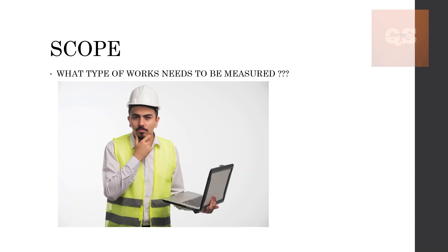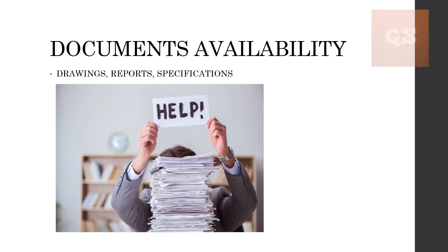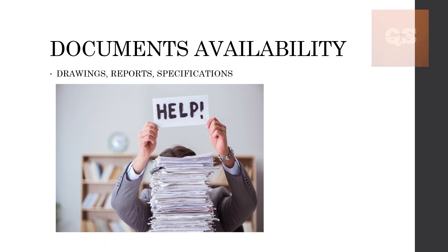Next is the documents availability. Once you get all the documents from the client to start the BOQ preparation, you need to check if all the documents are available or not. If any documents are missing—sometimes some drawings of some floors of a building might be missing, some reports or the specifications for that project might be missing from the documents that you have received from the client.